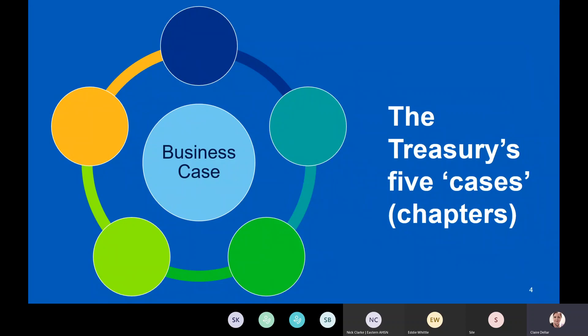The Treasury also has five cases — I'll call them chapters, because that's really what they are. They appear in all three business cases. The first is the strategic case, about strategic fit. The economic case is where you analyse your options. The financial case is where you work out how you're going to pay for it. The commercial case deals with tender documents, and the management case covers how you're going to run everything.